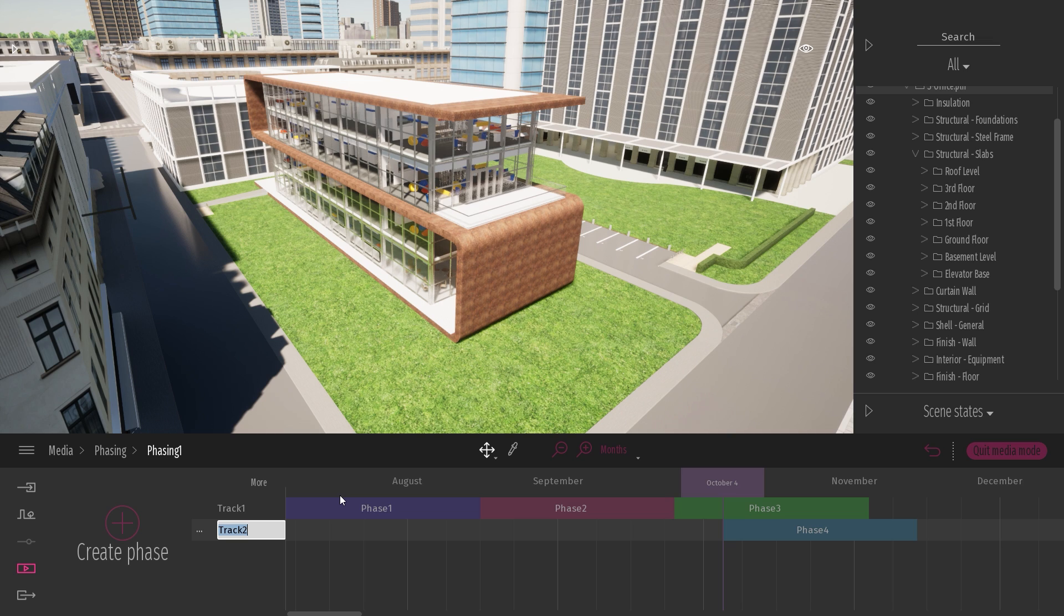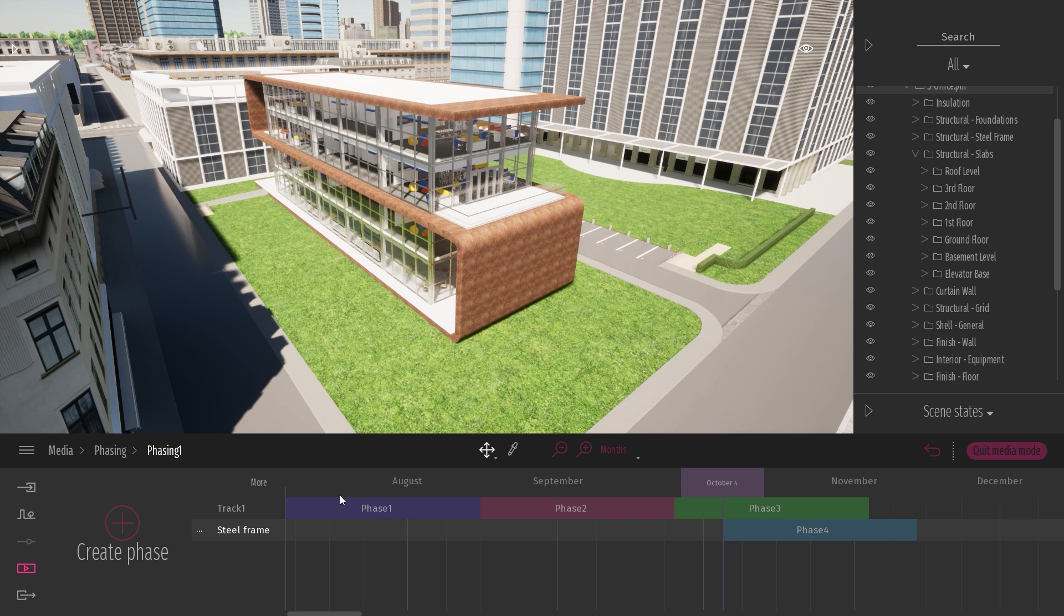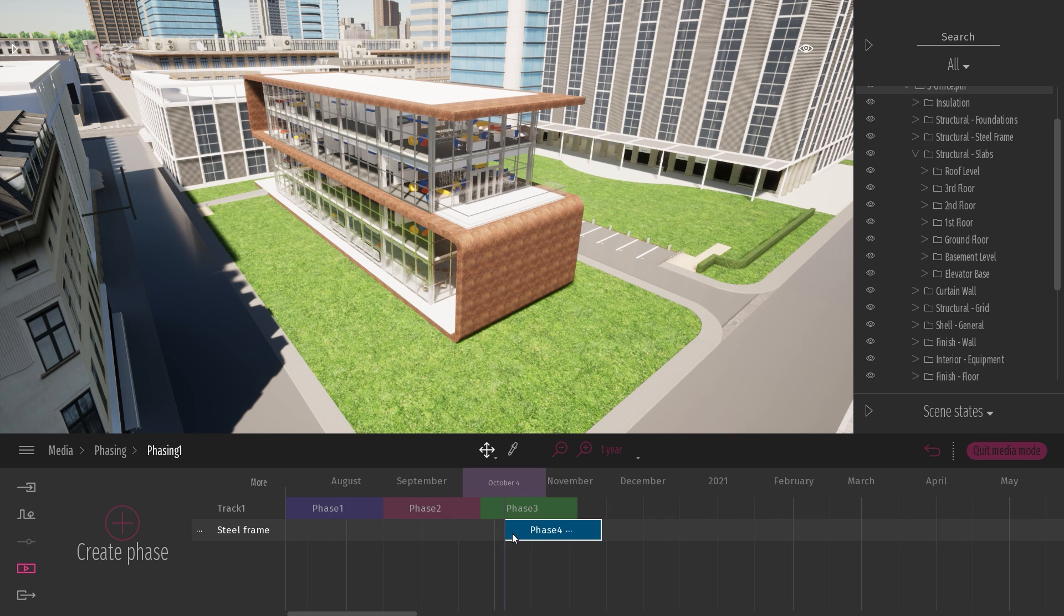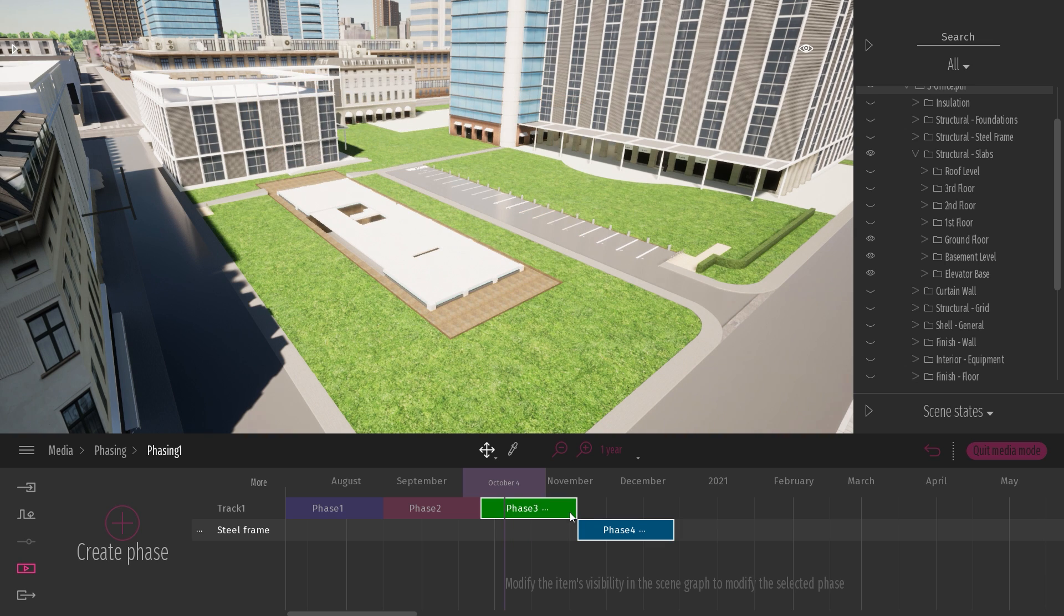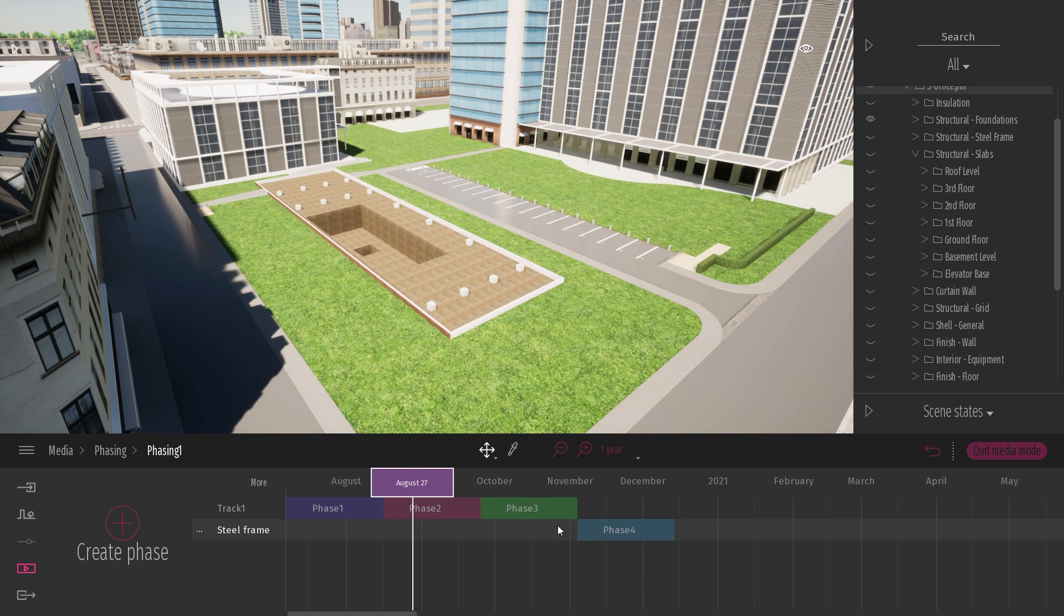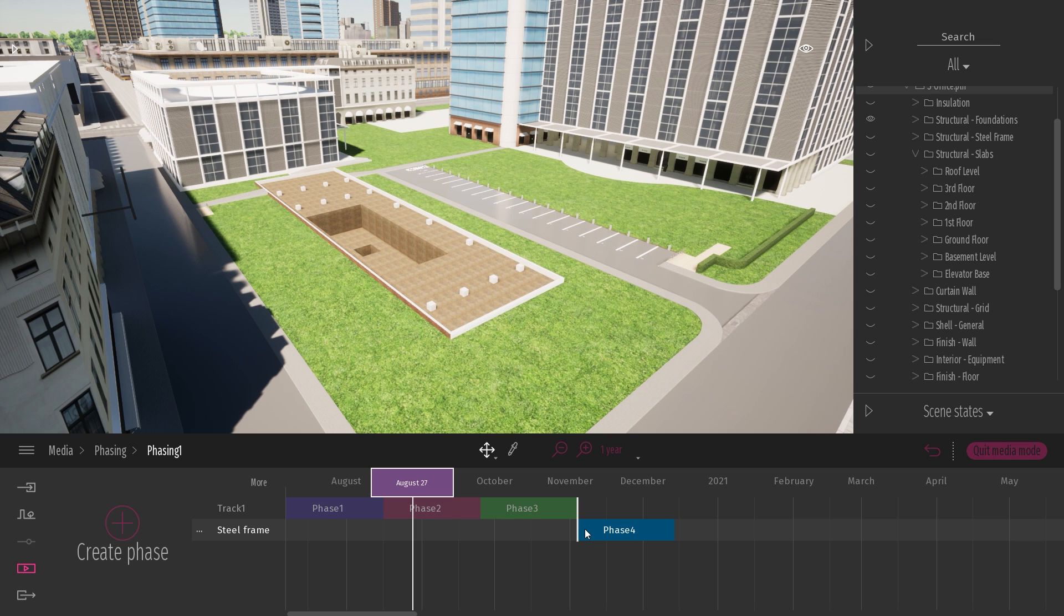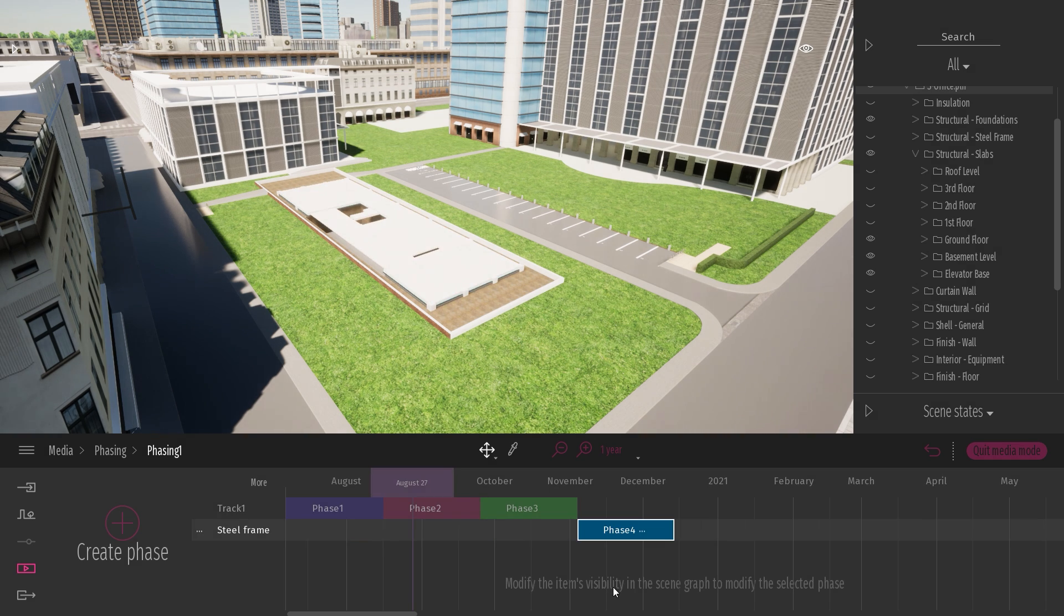Let's rename this track metal steel frame. So in this track, I just want to focus on the metallic structure of my project. So let me just put this track at the end of the other phases. As you can see, there is a snapping helper that allows you to snap the different phases together. You can also rescale them.